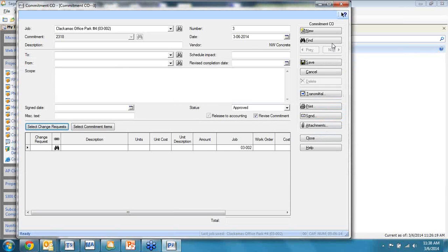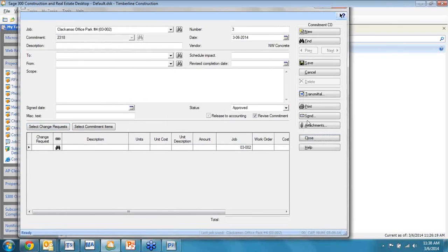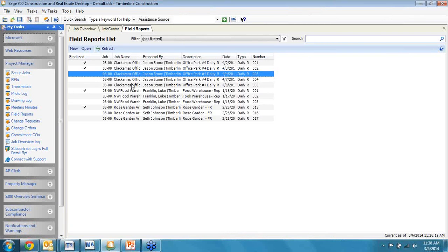And then as I pull those in, what we'll find is the same type of relationship. That when I issue a change order to the subcontractor, it will be linked and associated with the change requests that were approved by the owner. So it's an easy way to start to manage the upstream and downstream relationship on the change requests and use a very consistent approach and feel. Forms, sending, transmittals, printing, updating can all be done within one simple environment. We can get to that from that one component right there.